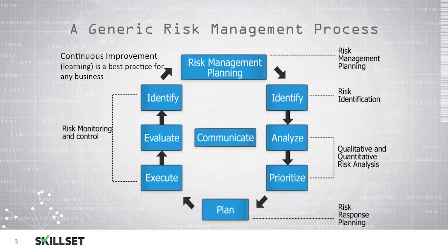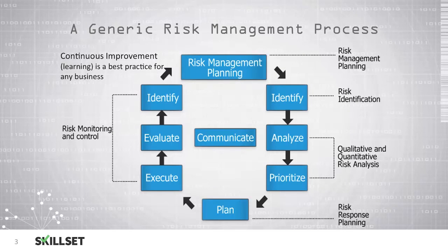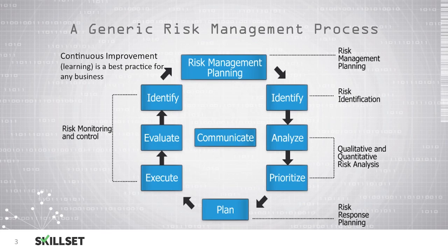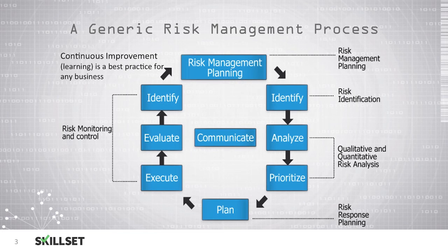Once our planning is complete, we will then identify our risks, then analyze and prioritize the risks using both qualitative and quantitative risk analysis. Once the analysis is complete, we can then plan on how we will respond to the risks. Once planning is complete, we will then execute by placing our controls to reduce our risk.